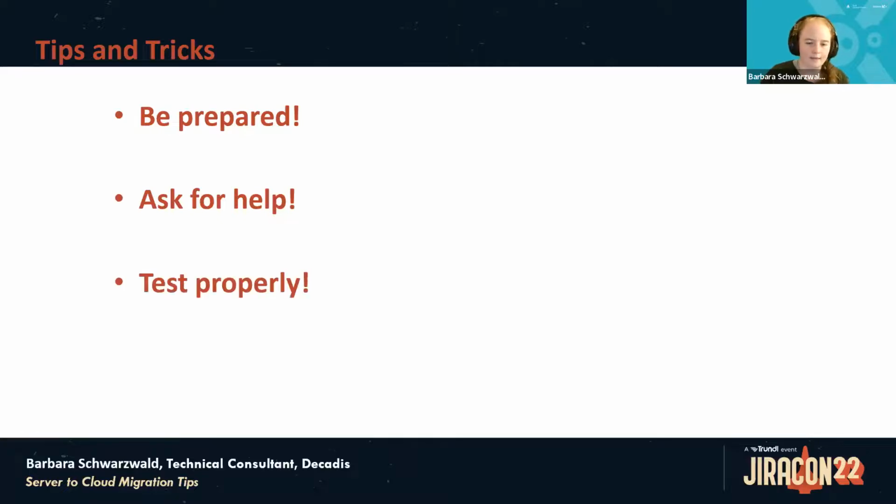And the third tip, which I cannot reiterate enough, is to test properly. This will help with all the challenges I mentioned before. If you do test migrations, you are prepared time-wise on how long such a migration will take on migration day. If you include your users in the testing, this will help with acceptance. If you test all the app functionality in the cloud properly, you know whether you got the specific test steps necessary for the app migrations down correctly. And the testing will help with all the challenges mentioned before.